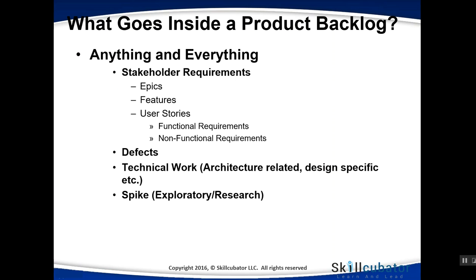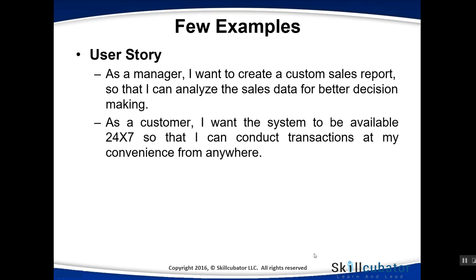The last type of backlog item is a spike — exploratory or research-oriented work where the team is unaware of how something will work and needs to invest time to learn about it. For example, a user story looks like: 'As a manager, I want to create a custom sales report so that I can analyze the sales data for better decision making.' This is a story written from a user perspective as a functional requirement in plain English, complemented by acceptance criteria.